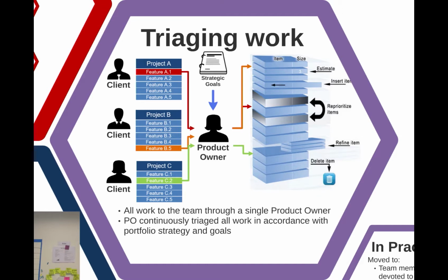So the product owner and his team, using this model, will then be able to see and have transparency of everything that's coming up, and importantly engage with their product owner on a routine basis in order to understand, estimate, create granularity, so by the time it gets to the top of the list, then it's good to go. No false starts. No delivering and starting work that's not adequately prepared enough to deliver.